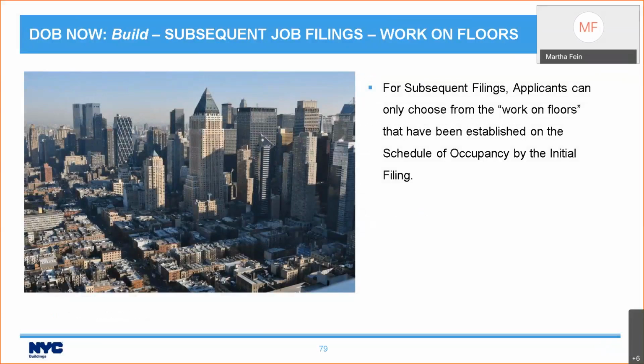Now, when you file a subsequent filing for a new building or an Alt-CO, you do need to fill out the work on floors section. And you can only choose from the floors that have been established on the schedule of occupancy by the initial filing.